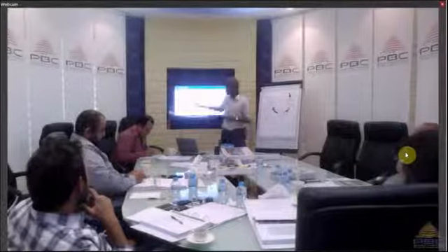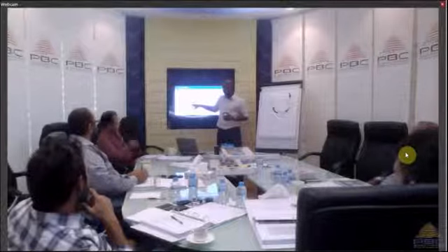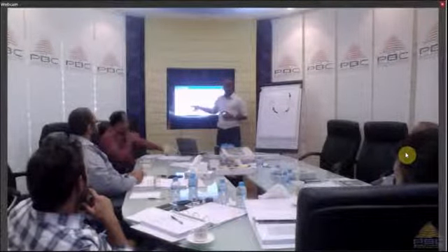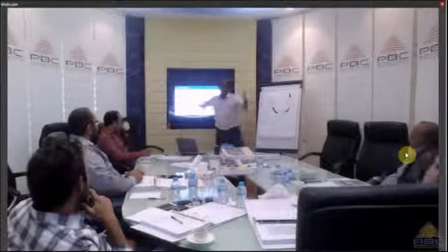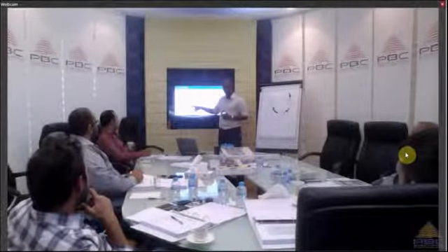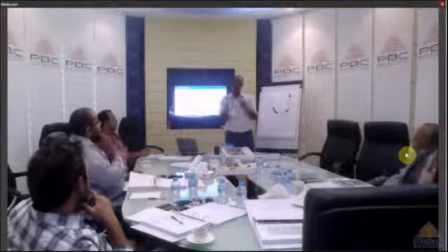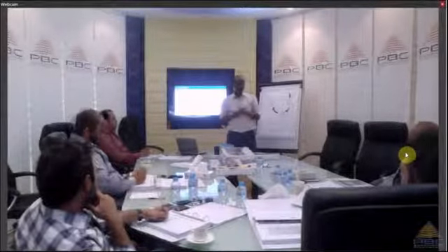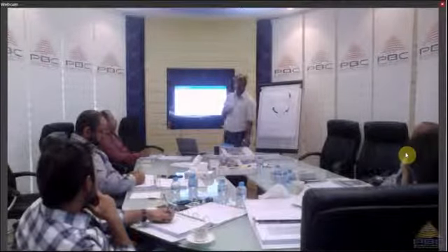Now, these exclusions can be anything, right? But usually, what do we put here in exclusions? Because I can say, I'm going to give you a phone, but not a TV, but not a laptop, but not a house. It could be anything outside the scope of work. But common sense, what do we put here? Things related to the product that the customer might think will be part of the scope, but it's not. This is what we mean by exclusion, and it comes only by experience.